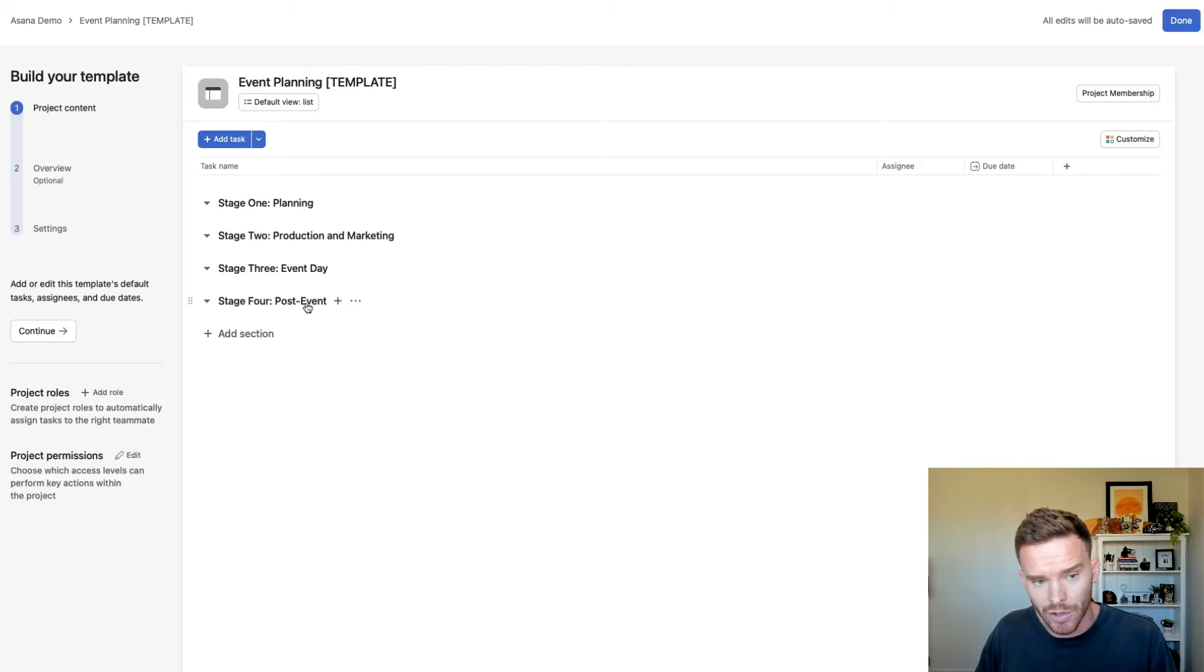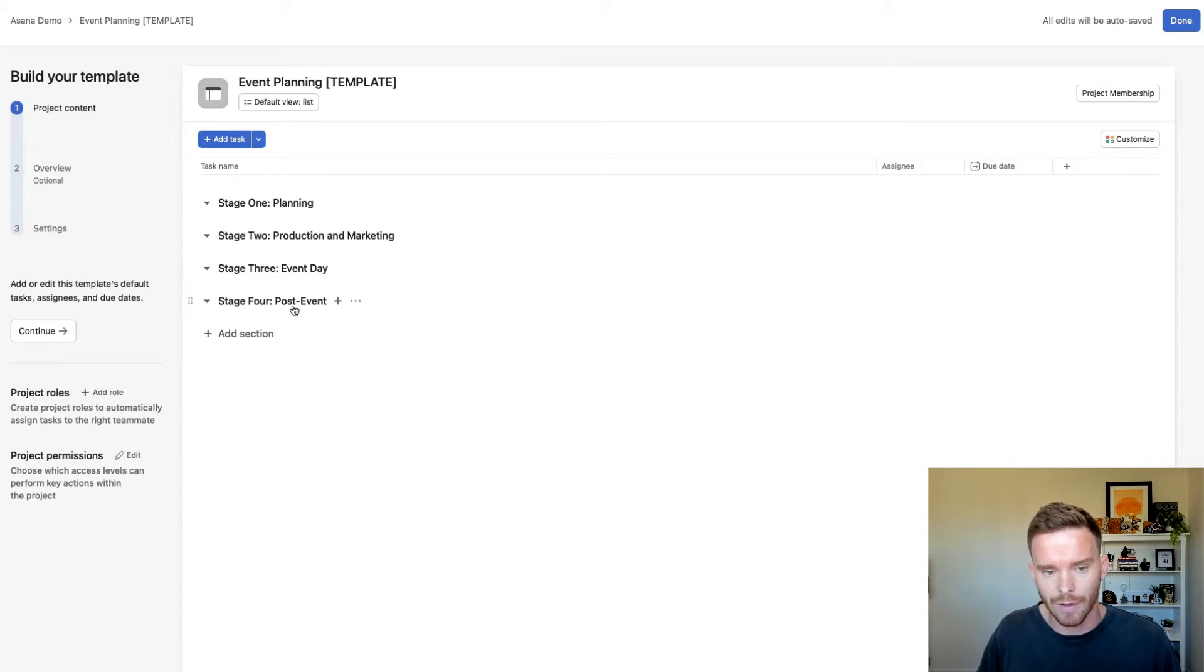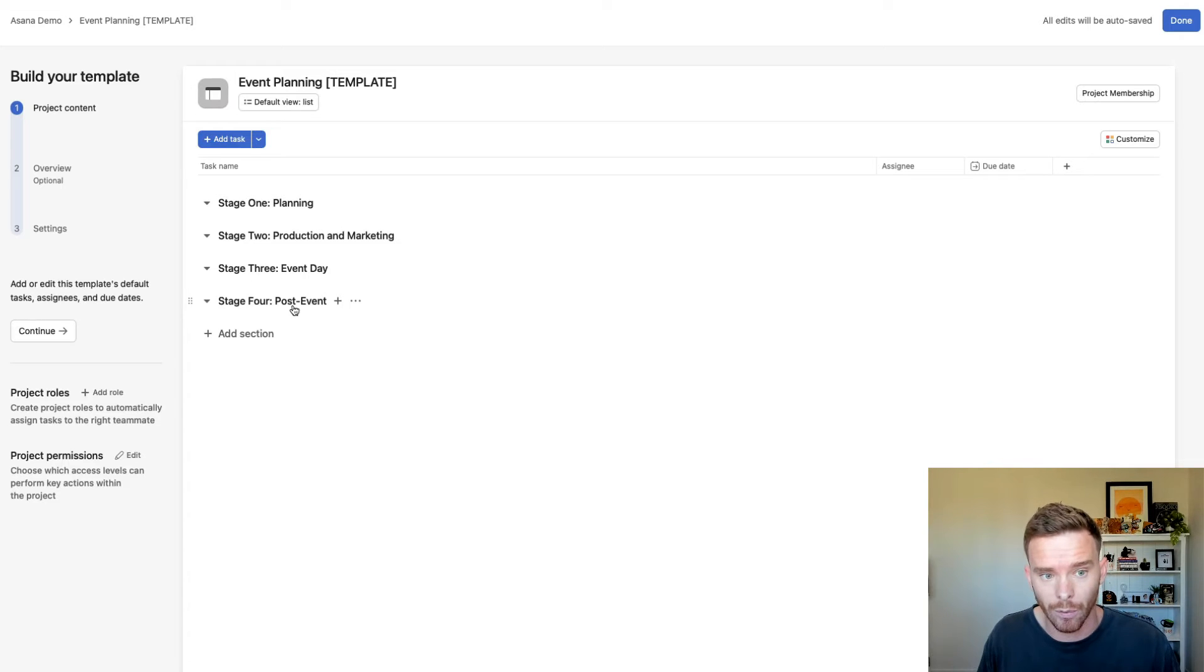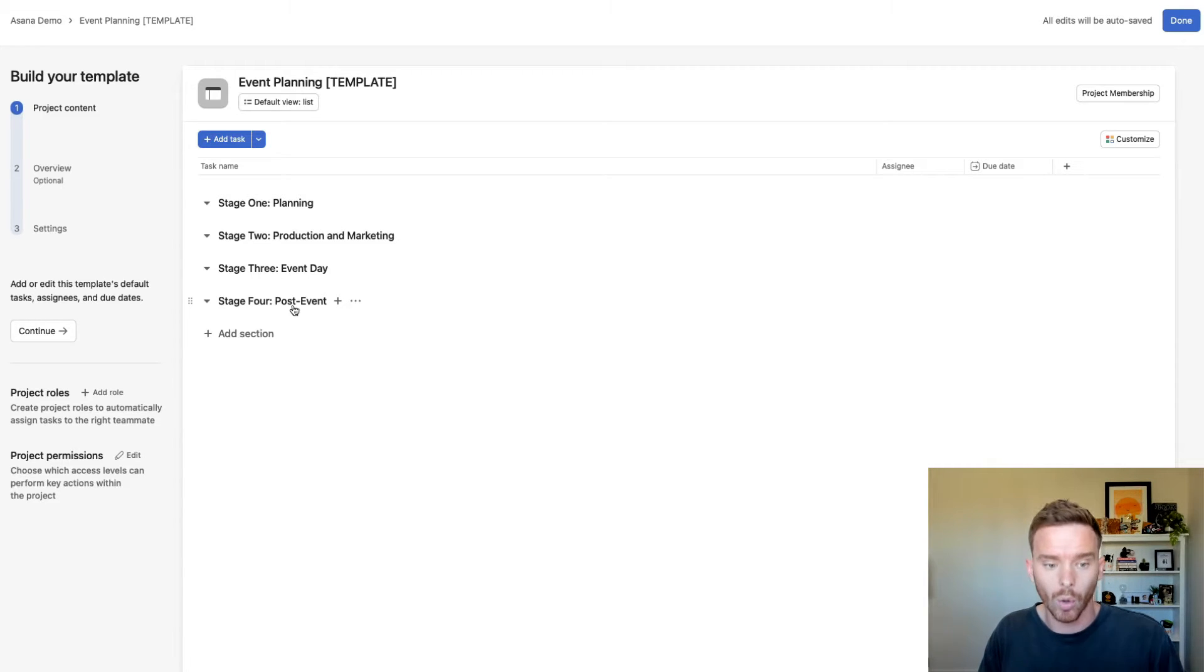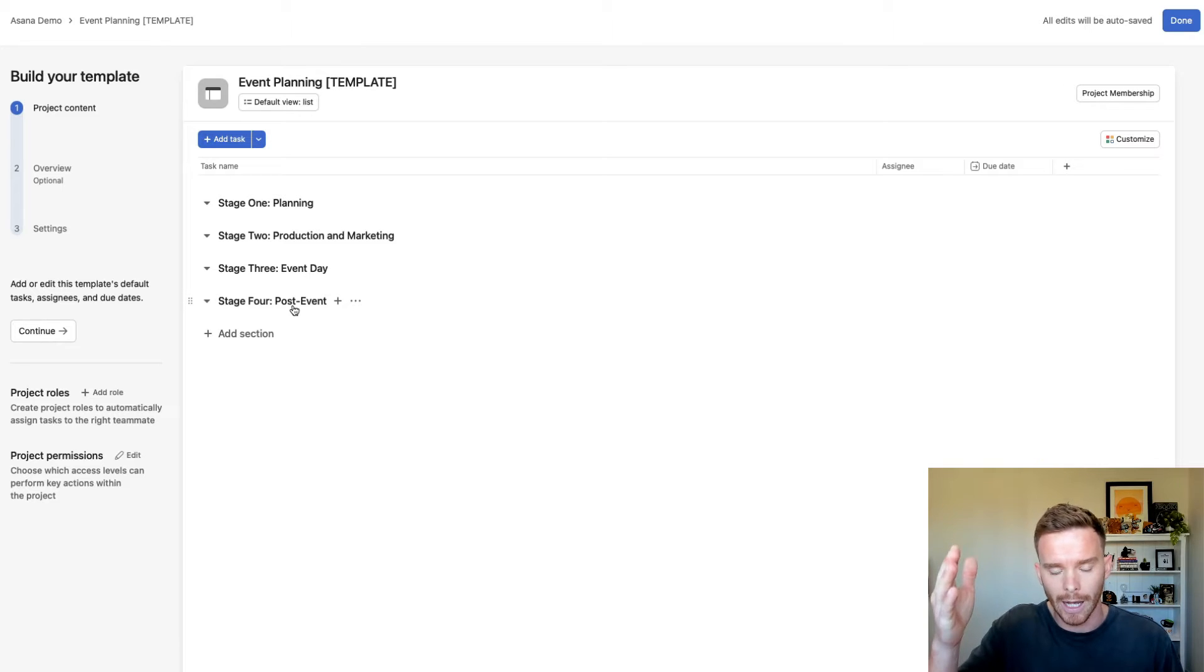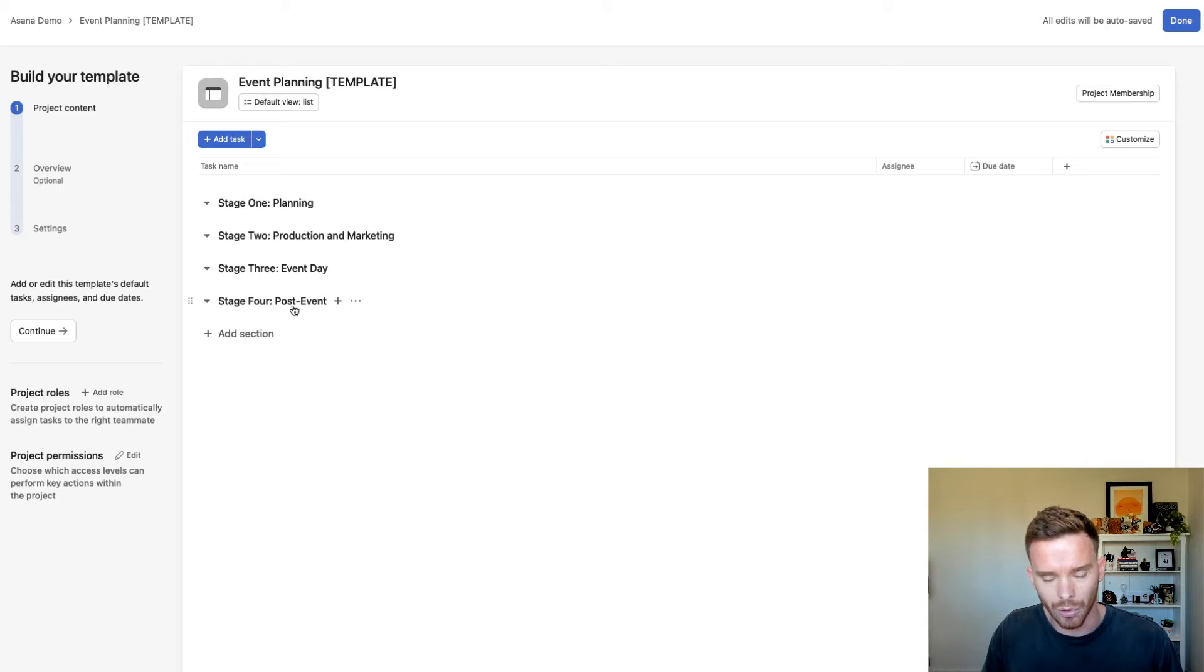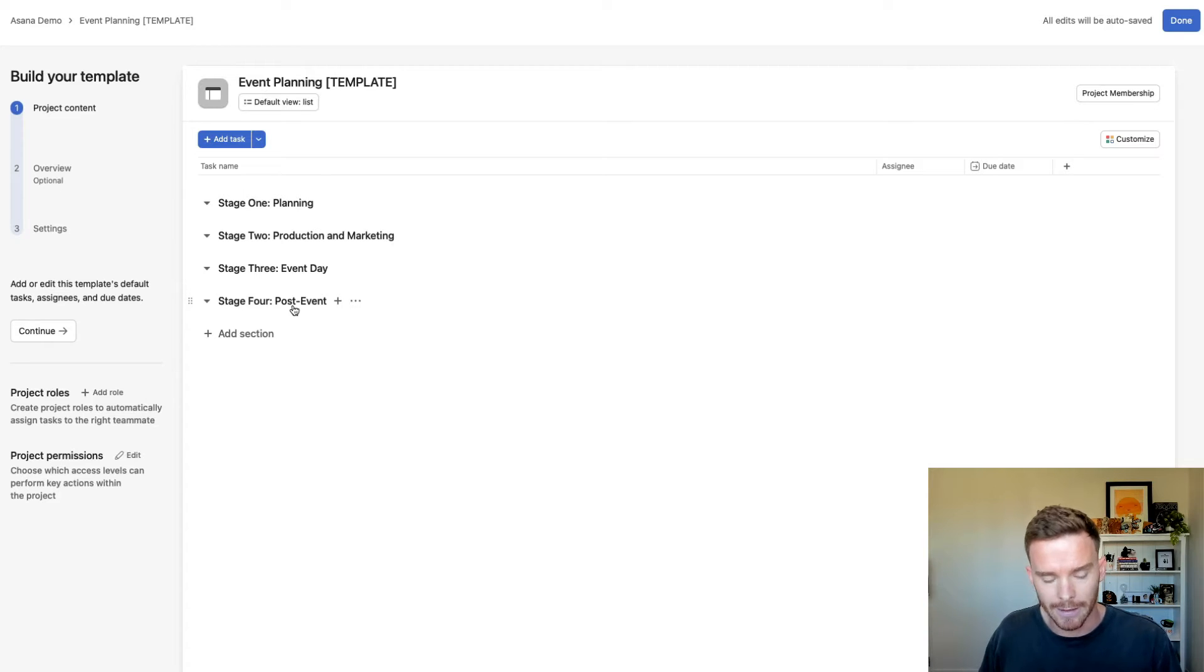Really, I'm using the sections as a way of categorizing or breaking up the tasks into different areas. So I could do stages like this, or for another type of project, I might have the sections for things like the categories of work. Or you might have seen people do the typical Kanban style of planning, where they have stages for to do, in progress, waiting, and then complete.